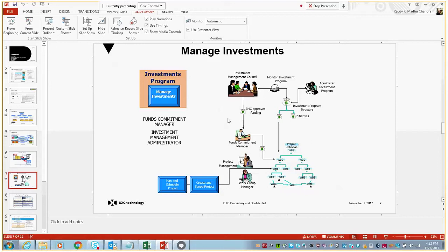So the final settlement run is capitalized, and this is when the AUC is manually converted into a fixed asset. So this is the overall overview of investment projects. And again, we have different types of projects, like externally financed projects and service projects as well.